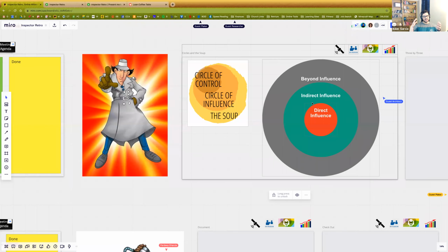over. And then there are things such as what tool the company says we have to use. Well, it's great to have a tool discussion, but if the company has mandated a certain tool, I'm sorry, that's beyond your influence. If you don't, okay, maybe you have in your company a way to influence it. The companies I've been at, I've been defined a tool set. They've told me you may use these tools and no others. So it's beyond influence. So there's not a lot of sense in talking about things to change that are all beyond influence. You want to focus on direct influence and then things in the indirect influence.